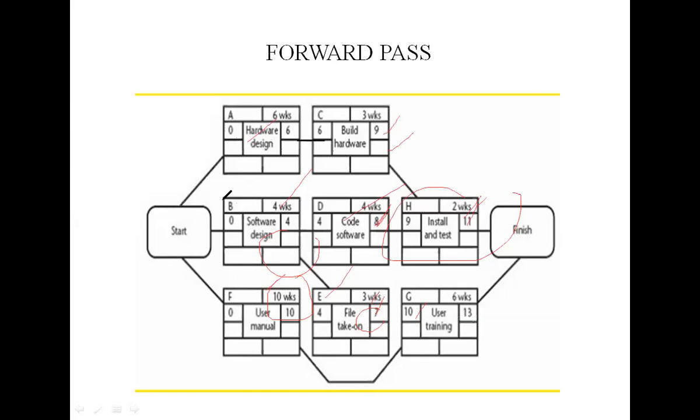And the last start date of the project start is the earliest of the latest start dates of activities A, B, and F. Otherwise it does not start on time.